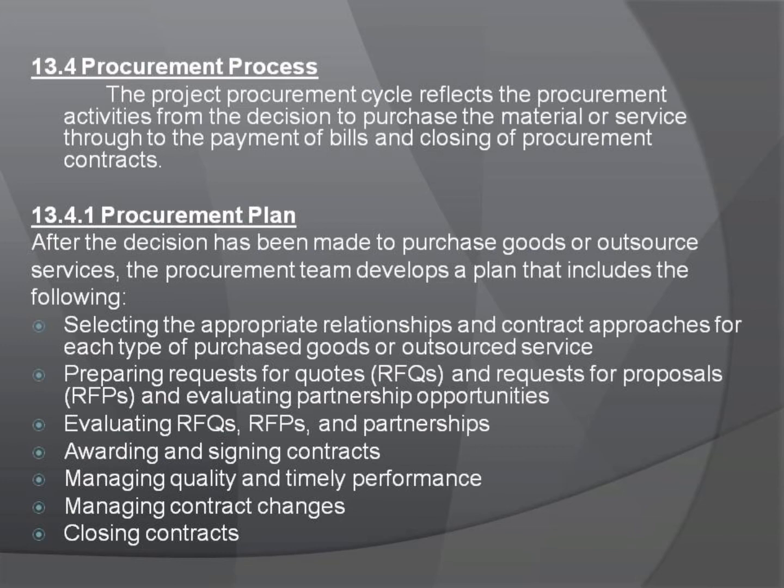The time involved in the procurement cycle can influence the scheduling of critical activities, including the decision to self-perform the work or contract the work to others. The delivery dates for equipment and materials and the work completion dates for contracted works are placed on the project schedule. Any procurement activities that create a project delay or fall on the project critical path may require special attention.